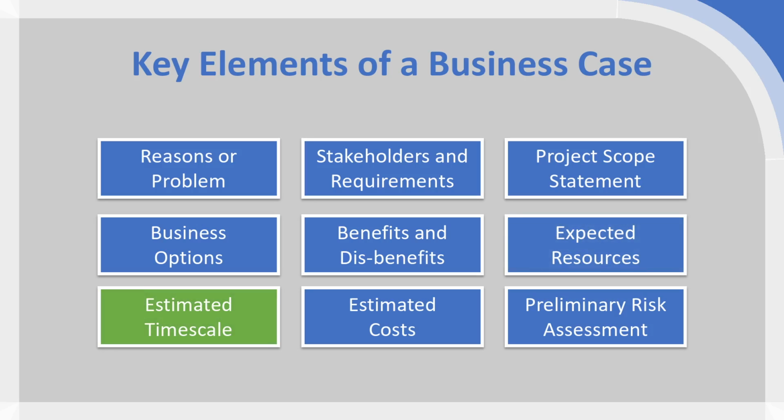In a very similar vein, you want to identify your estimated timescale as well, so how long you expect the project to be going on for, as well as your estimated costs. And those are pretty straightforward. It can be very difficult at this stage, because you haven't started your detailed planning, to have an exact resource management plan or an exact scheduling plan or even an exact budget. So at this stage, it's still very, very preliminary. It's just the initial estimated resources, timescales and costs.